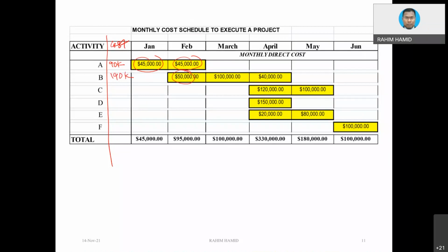So we start with 50,000 and there is a peak there and then it reduces. It is like a parabolic. This kind of thing is much more realistic. In the real project, the cost is not going to be prorated, because for certain activity, 190, you are going to spread according to the real work.